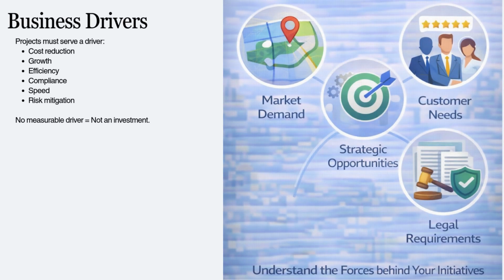All of those components ultimately point to one thing: the underlying business driver. Because projects do not exist in isolation, they exist to serve a strategy. Every project must anchor to a business driver, for example, cost reduction, revenue growth, efficiency, regulatory compliance, speed to market, or risk mitigation. If the project cannot clearly link to one of these, it's not an investment, it's just an initiative. Let's look at a real scenario.